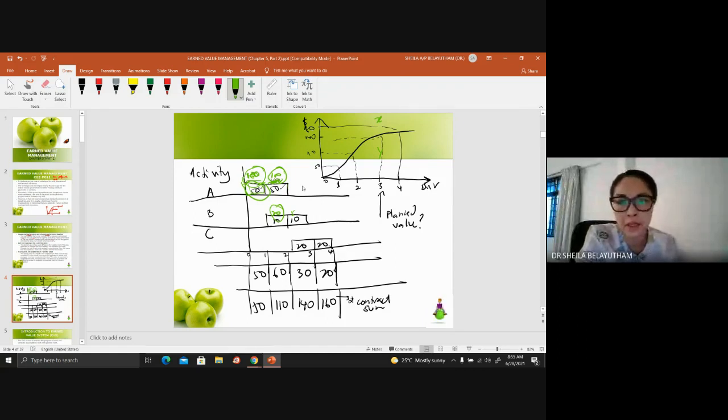So let's say for activity A, I am monitoring at the second day. For activity A, I'm monitoring here. So by right, for activity A at the second day, I should have completed 100% of activity A. If you go onto the site and you realize activity A belum habis, so it has not been completed, you have only completed 50% of the work on day 2.